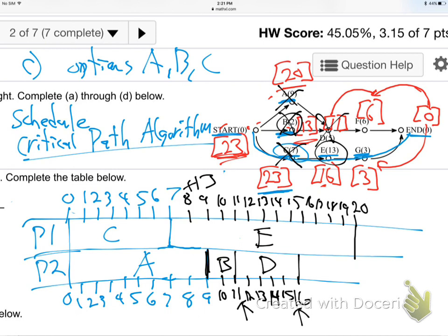But if the map gives you some options, 2 or 3 choices, that's when you pay attention. Does that make sense? So in this last step, I had to do D. It doesn't matter what the numbers say. D was the only job available, right? Because A, B, and C were done. E's already being worked on. I can't do F or G. D's the only choice. So the map only gave me one choice. I didn't need to look at any numbers anywhere.